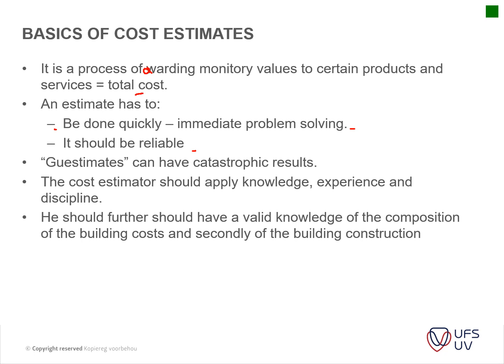He has to know what the influence of one professional is on the other. So for instance, if the structural engineer changes something on this side, it may influence the look and feel of the architectural side as well. Where will the electrical ducting go? Will it fit within this flat roof design? Is there enough space? Air conditioning ducting is usually a big challenge. Do the services clash with each other? Those are the things that he has to look at.